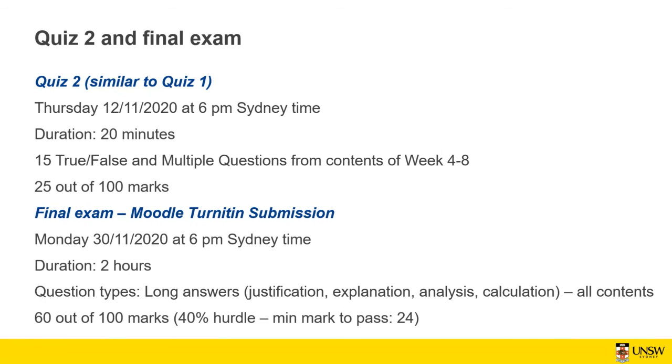Okay, so your budget at completion is not going to change. It's always the budget that you plan to finish this project with at the end of the project. So it's the budget that you have at the start of the project to do this job. In this case, for the renovation, you put 100K in order to do the job, and at the end of the project, if everything goes all right, you need to spend 100K.